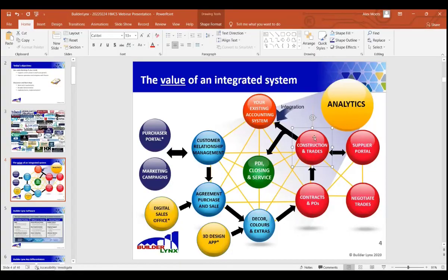There's a tablet app that the construction team can use to review and access scheduling information on a per job basis or on a lot by lot basis or on a task by task basis and various things like that. But basically they're using that to control the construction schedule and update the actual construction schedule on a task by task basis. And that will have implications on updating associated purchasing documents as well, depending on how your schedule is tied together to your purchasing documents.